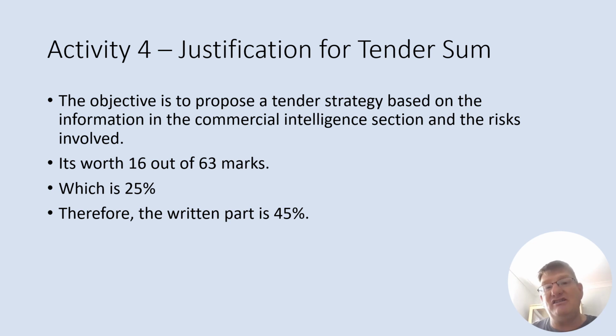Recognize that you are a local company, so you understand the market. That's quite good. That puts you in a strong position. However, you do have an office. It's a regional office. Company overheads: if you divide, it's 1.5 million divided by 22 million. Your office overheads are 6.8%, so 6.82% actually, if you want a more specific calculation. So around 7%, I would round that to 7%.